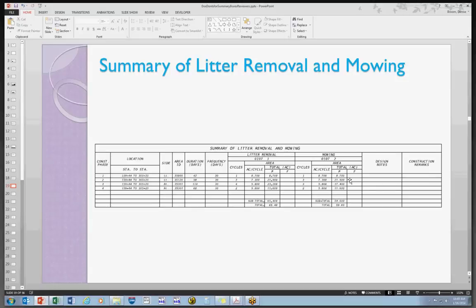Edge of the travelways to the right-of-way line, minus any inaccessible areas. If there's an area that's designated as the contractor's area that would be inaccessible because it's behind a barrier wall that they can't get to, then that would be an inaccessible area.